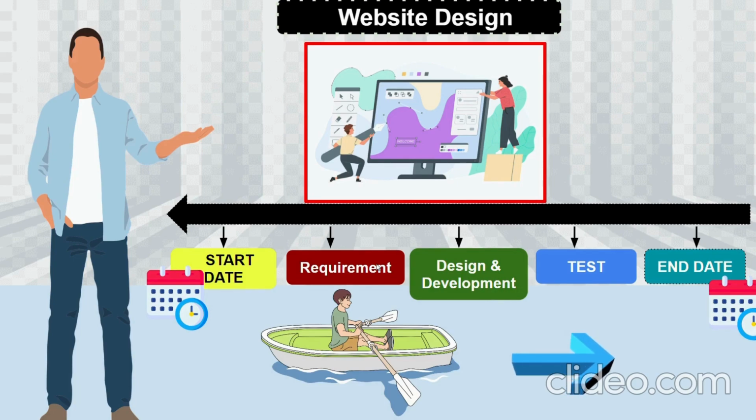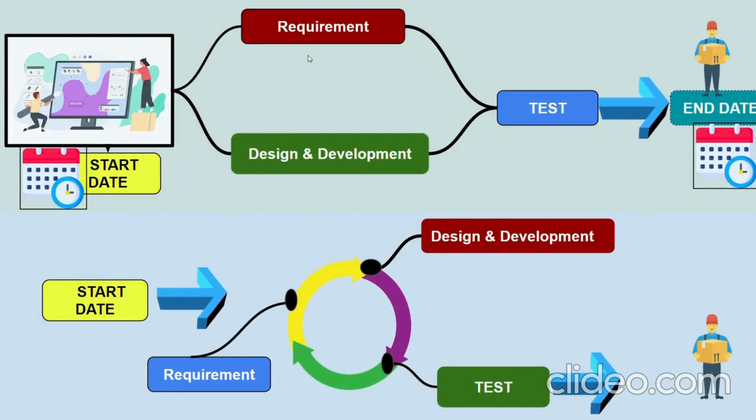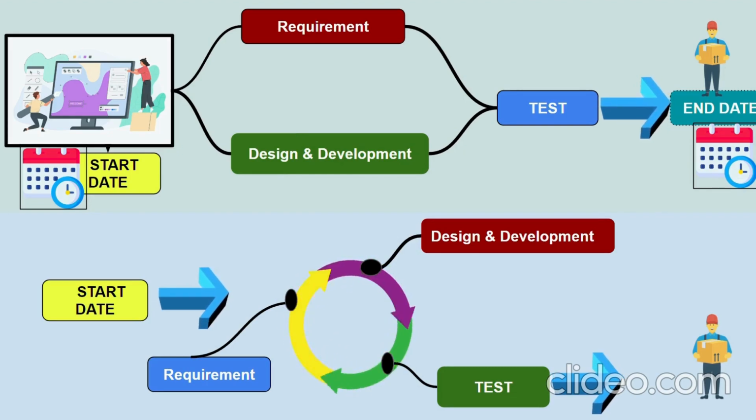However, this is not the only way to do a project. There are different approaches which you can opt for based on the project type, your organization culture and the scenario in which you are doing the project. These are the options which you have. The very first option is that you can run your project phases in parallel instead of sequentially. So if you have 3 phases and you run 2 of the phases in parallel, it saves your time.